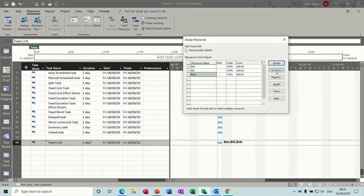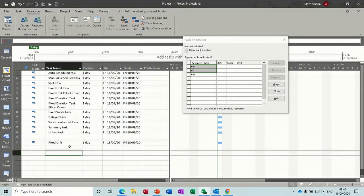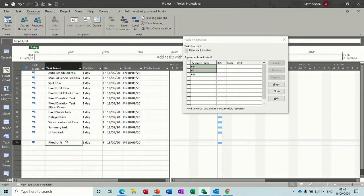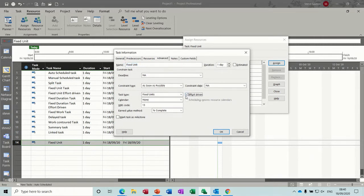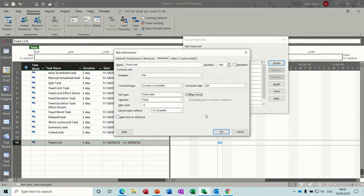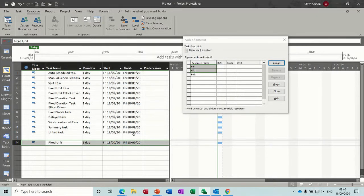If I remove all these people and go back into it, and we just put that to a one day duration so it's got a fixed day. And put the effort driven tick on. Now what will happen is, when I allocate my first person, nothing will happen to the duration because that's my first allocation of resources. But any subsequent allocation will start driving that duration down.